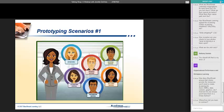How do we ensure we have them in a timely fashion? Oh gosh, welcome to my life. I have projects that I just actually canceled. Last week I had to cancel 2 projects because we've had storyboards out there for months and they never got reviewed. So we sent them a project cancellation letter that said, I'm sorry, the project's now canceled. If and when you're ready to restart it, call me.